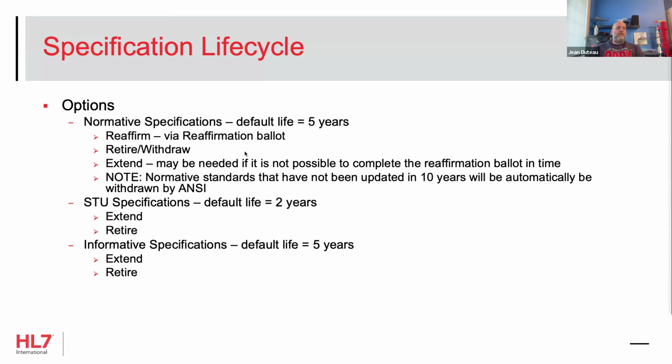That's for normative specs. For STU specifications, the default life is 2 years. At the end of that 2 years, you can extend it. You can't extend it indefinitely, notwithstanding some of our specifications like CCDA. The intent is that STU is the step towards normative, so you're going to take your STU and make it normative. You might need some more time, so that's where you would extend it for another year, or another 2 years.